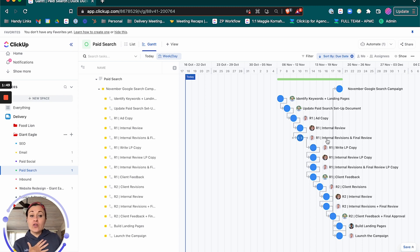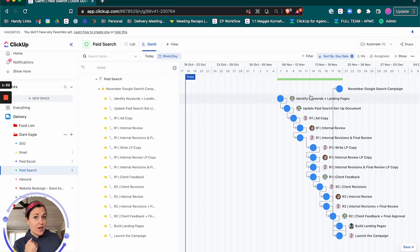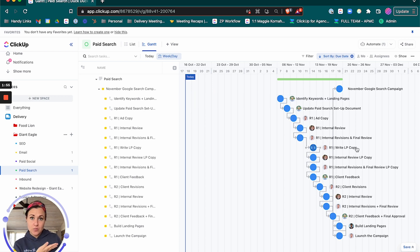All of these other items stay put. That's because they aren't dependent on this item that we needed to move forward.